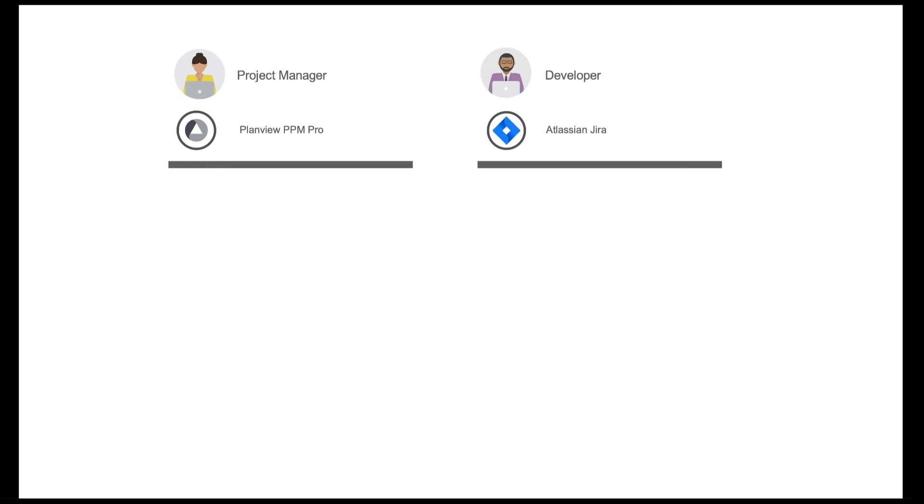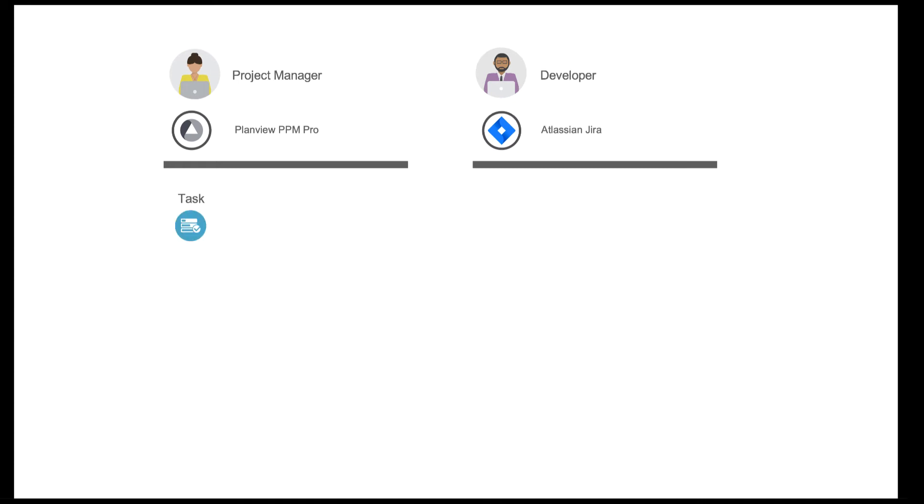Before we jump into the tools so we can see each practitioner's experience, let's take a quick look at what's to come. The project manager creates a project plan in PPM Pro, and the plan she builds out includes multiple tasks. Tasktop will flow those tasks over to Jira as epics, with the priority and other project details for the development team lead to work on and assign.